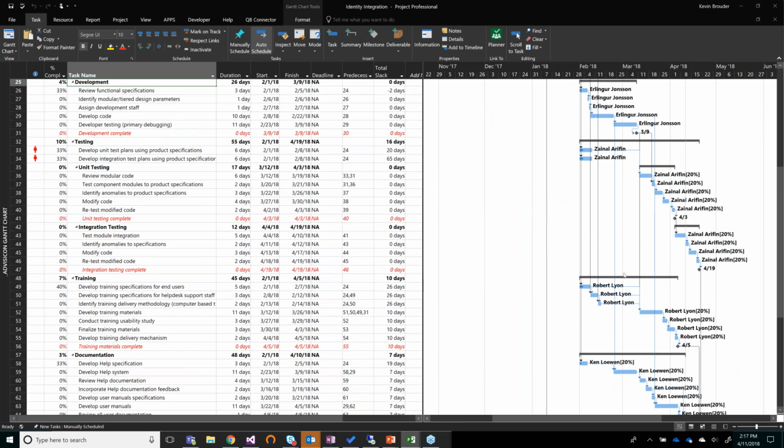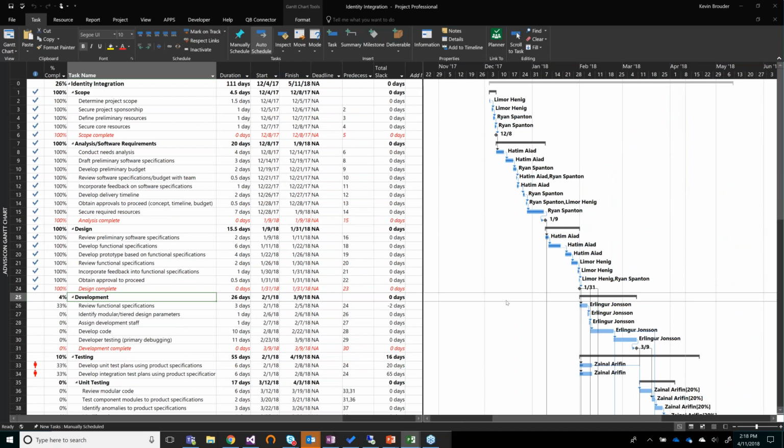So some quick tips when we're starting to examine a schedule. First things I like to look at is our critical path, and also with that, our slack. And so quick tip in Project to quickly see your critical path. You've got lots of different ways to do it, using a field. There's a field that shows you whether a task is critical or not. You can create a highlight rule that highlights tasks off of that field. But one of my favorite ways is just in the Gantt chart. If you right click anywhere, go to show hide bar styles and click on critical tasks here. This is going to add a bar style to your Gantt chart to show you the critical tasks in your schedule, and it will make them red.